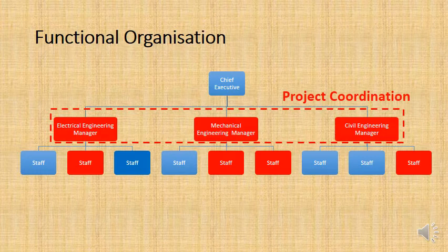But the other issue is that the civil engineer may not be communicating with the mechanical engineer and electrical engineer. That can break down. Let's say in the civil engineering team, we're working to design a very good penstock and a very good draft tube, and the mechanical engineers are working to design a very efficient turbine. What happens if there's a lack of communication because they've ended up working in silos? Well, potentially the turbine won't fit with the penstock. The 2 components won't be a good match, and you end up with a lower quality for the overall product.